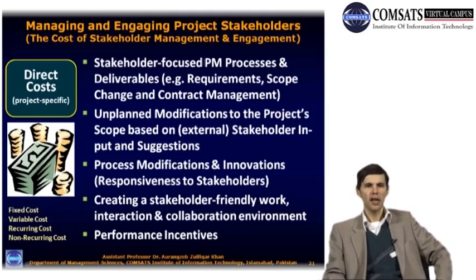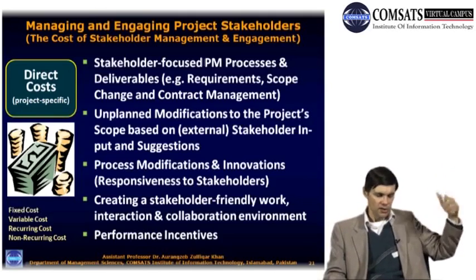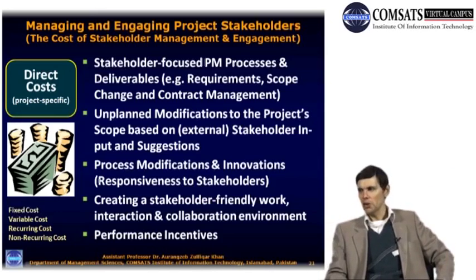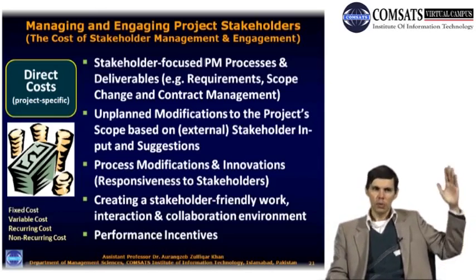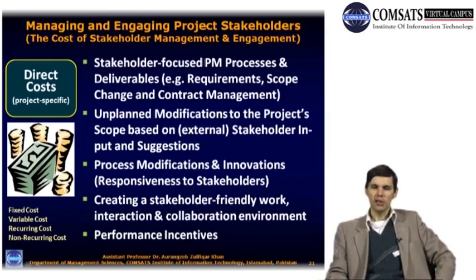When the stakeholders say, we don't want such a high building to come up in our area, it's too high, it's going to block our view, it's going to block out the light or the sunlight, whatever. And then in order to accommodate the stakeholders, one can say, okay, well, we won't build it so high, we will maybe build it a few stories less. So there might be some costs related there to redesign, for instance, or reshaping.